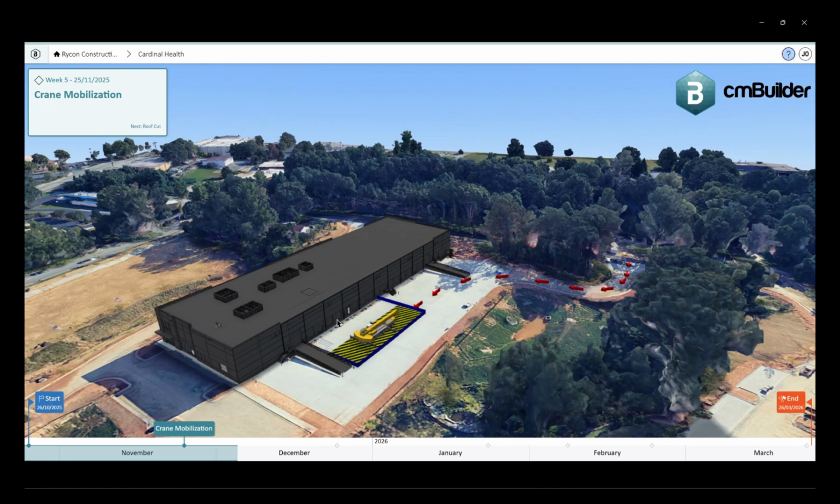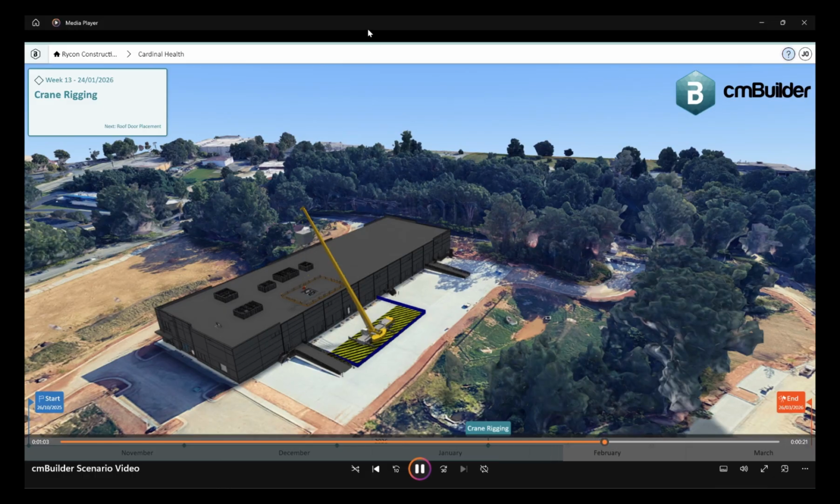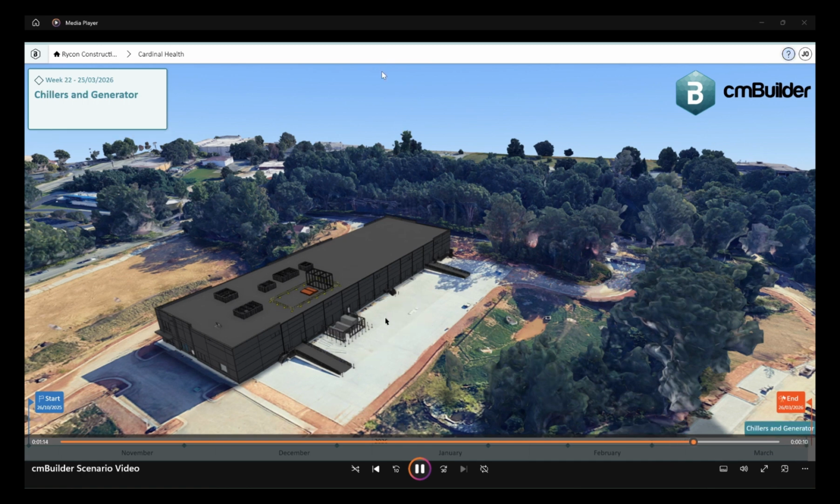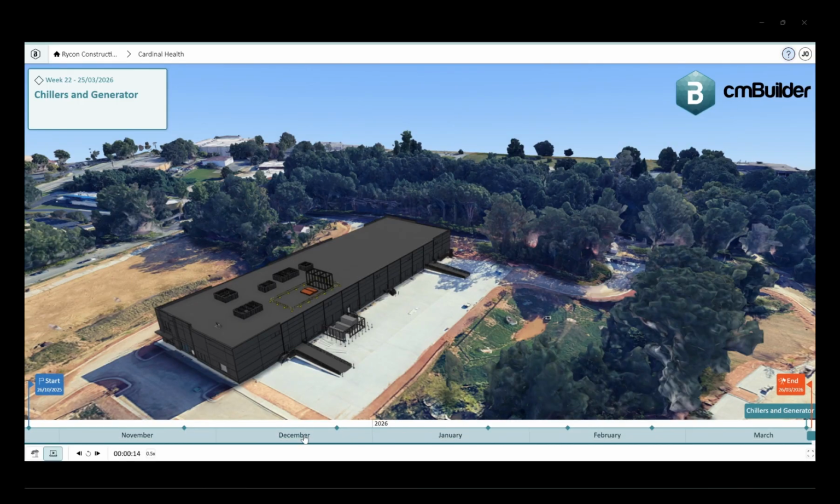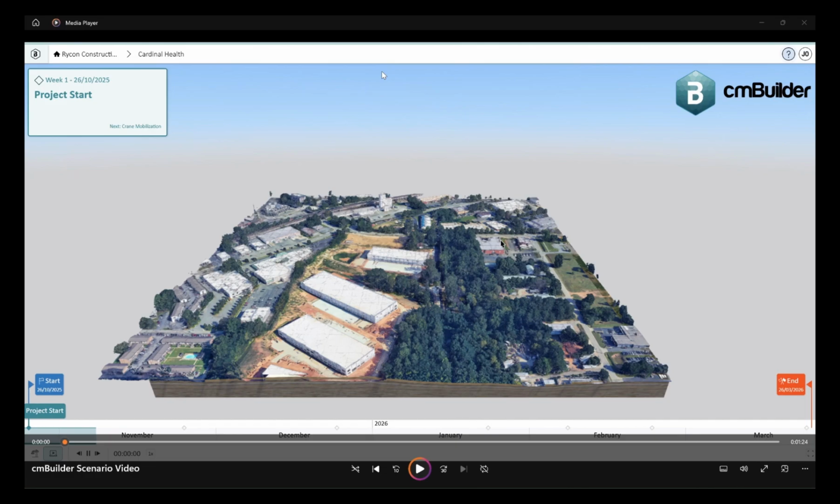Now you can create scenarios like this for everything, for each of the RTUs, any crane drop, but realistically we were able to see that this wasn't the best tool for the project. And the main reason was because we really just opted to go with a simpler solution. This was in favor of cost and time. We just made a simple crane pick matrix. This was done using Excel. It contains the items being picked, the responsible contractors, item weights, and crane pick dates.